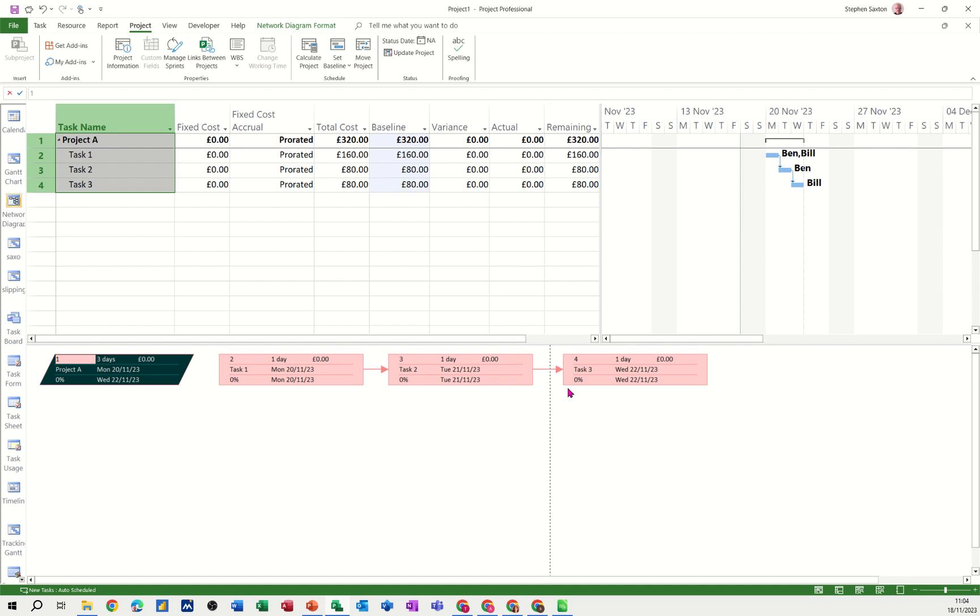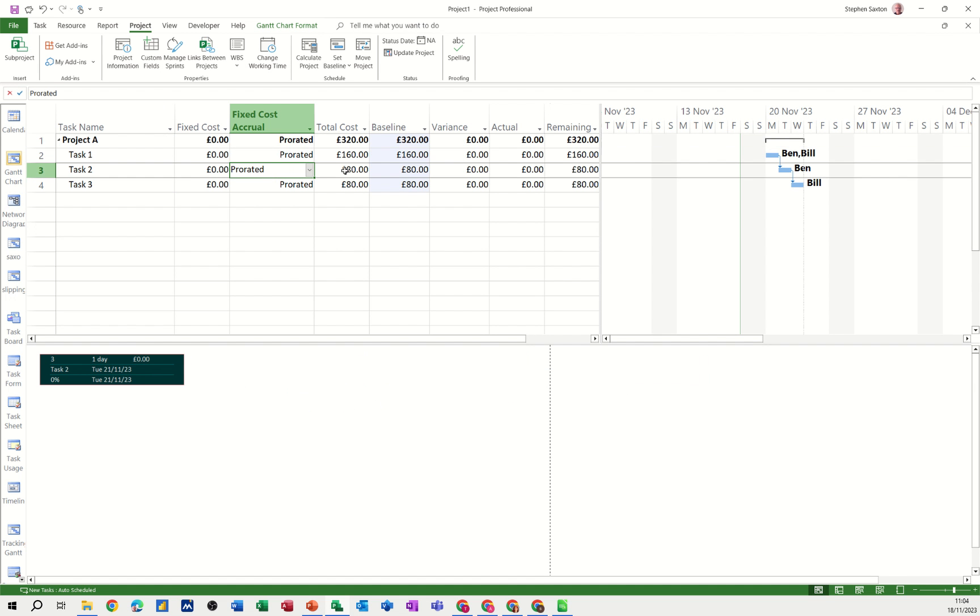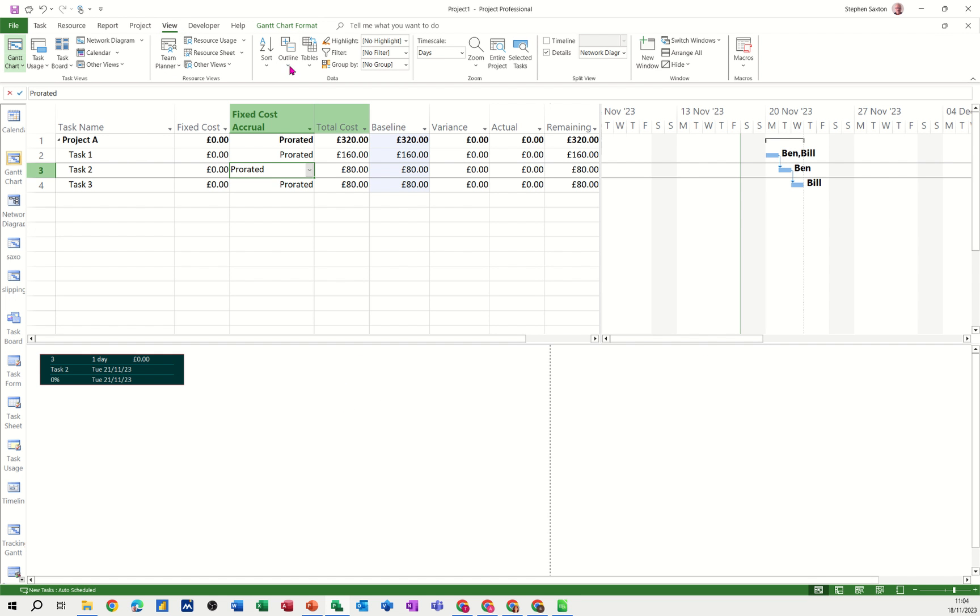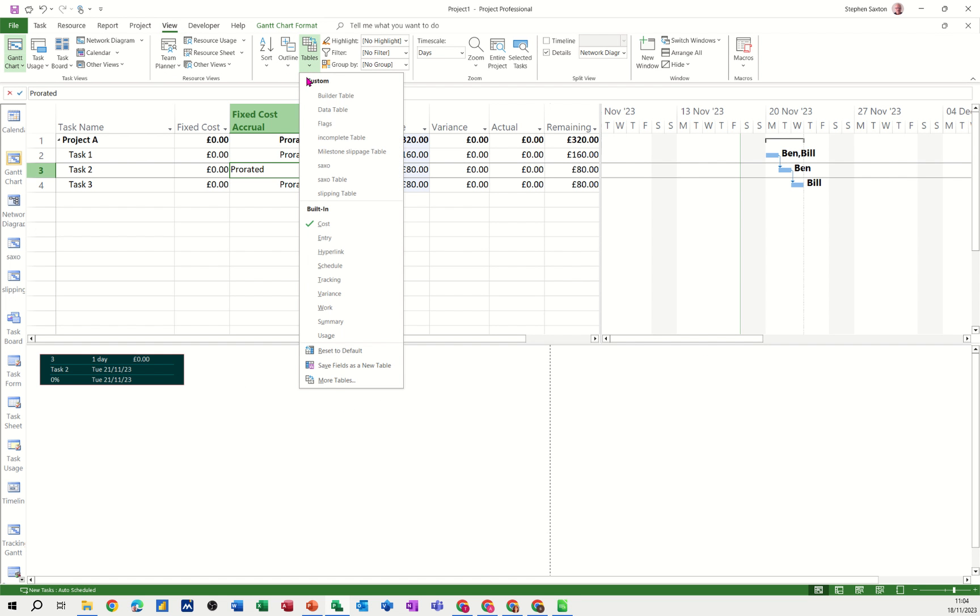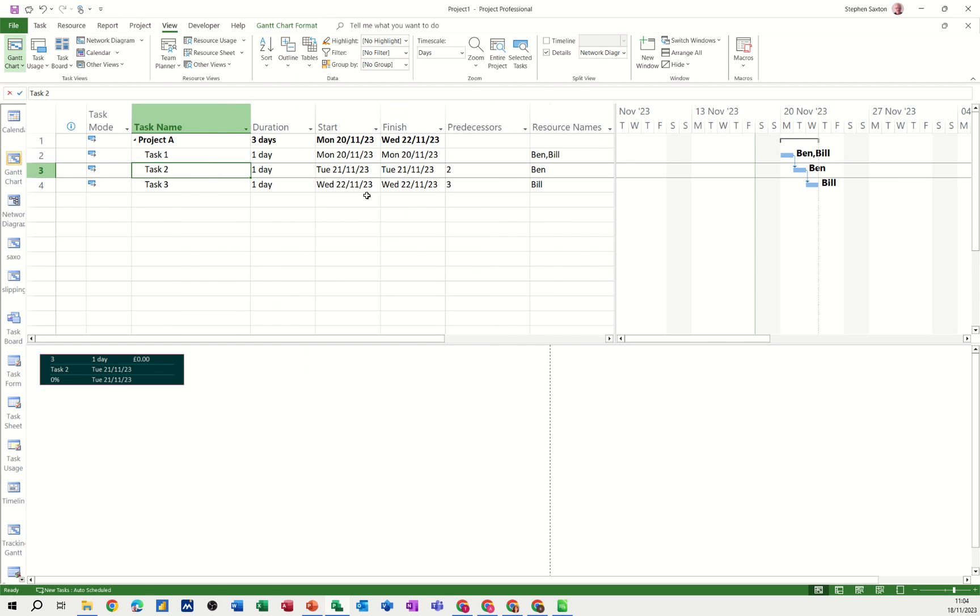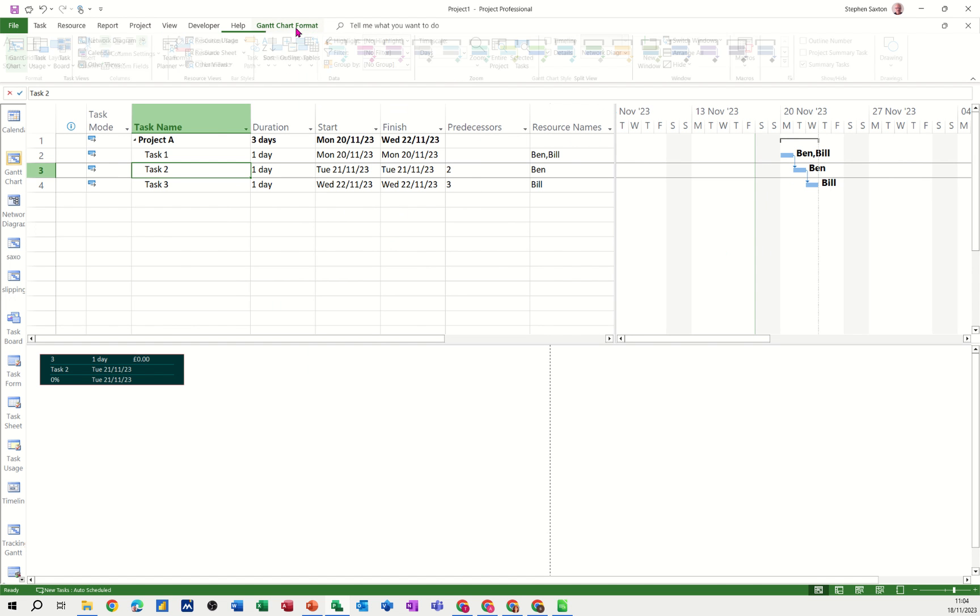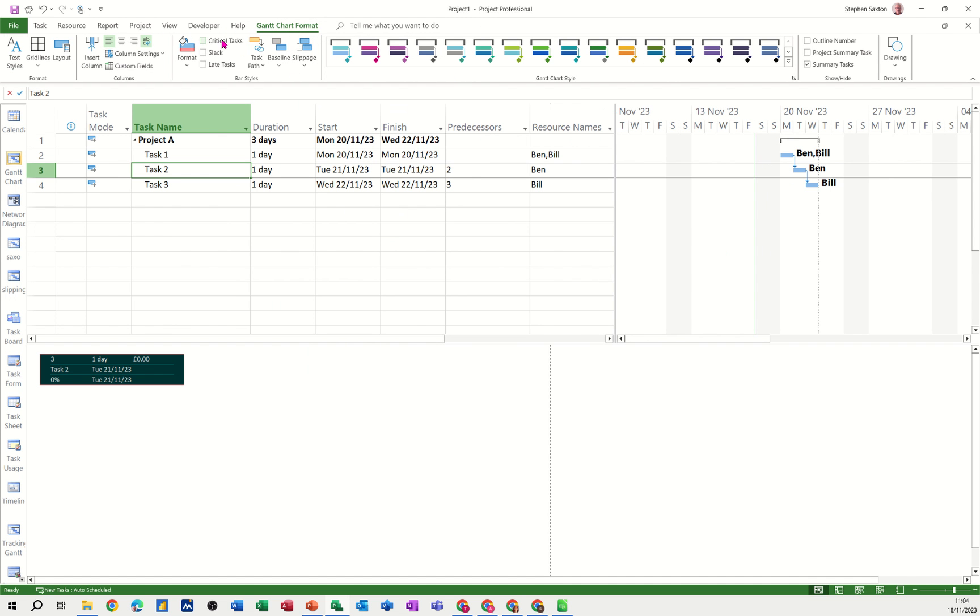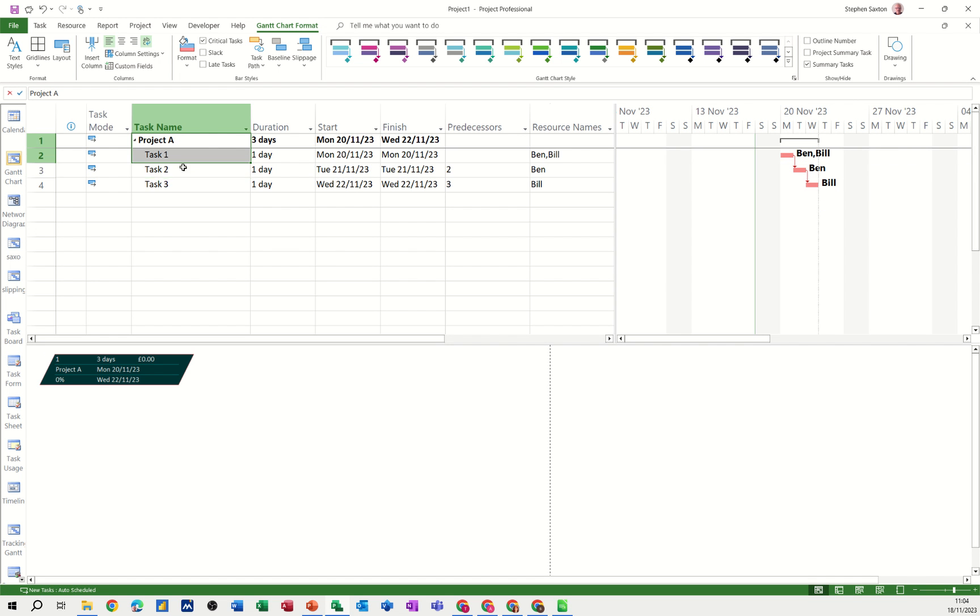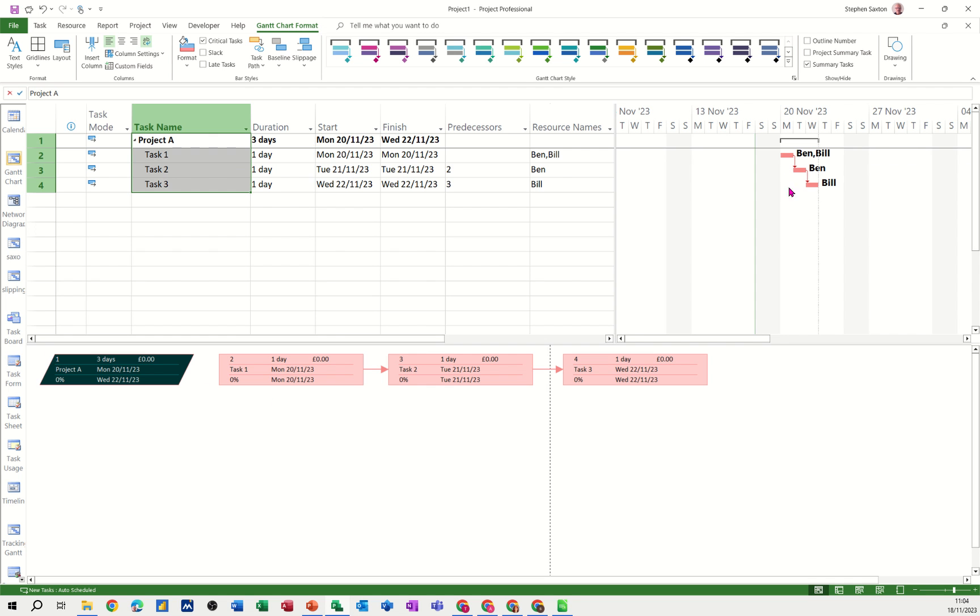Now they're all showing critical. And if I go back to the top part of the screen and just go back to view and select the table, put it back to entry for a second. This is critical, but it's not displaying critical. If I go to Gantt chart format, I can tick this option. And they're showing red as well. That's why they're red.